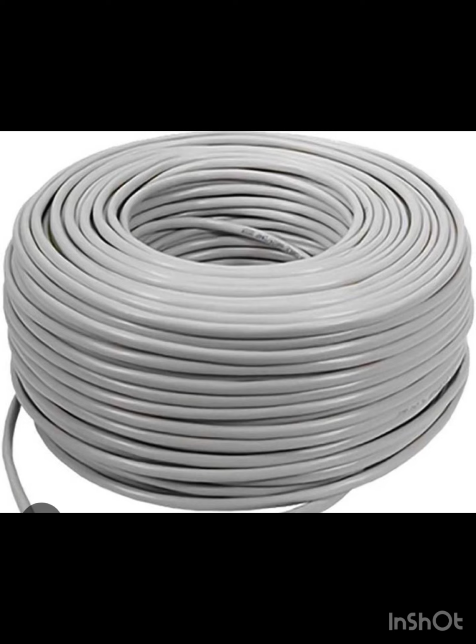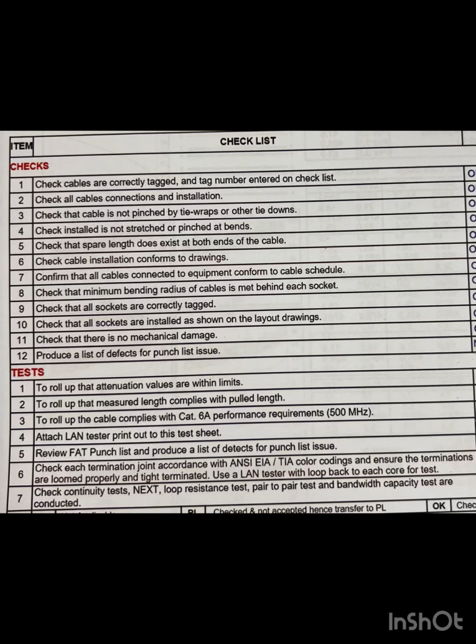All right, check the cable installation. It must conform to the drawings, so you need to verify based on our IFC drawing. This will be correct. Okay, and confirm the cable is connected to the equipment based on our cable schedule. All right, so this is all about that. Then check the minimum bending radius of your cables, so it will not be damaged.